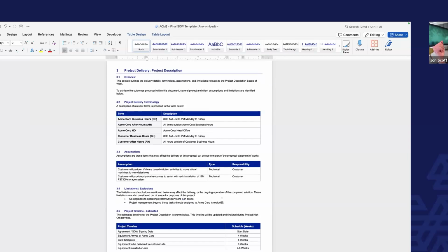What it does too is it gives your engineer, so you're scoping this work, assume the client signs off on it, they're going to start delivering this work. By having a very clear out of scope section, it gives your engineer who's doing the work an opportunity to say, hey, say we're doing a server upgrade or something like that, and we want you to upgrade our network to support this new server. Well, that could take a whole week beyond the initial scope, right? And you need to give the engineer an opportunity to say, hey, this is actually called out specifically here that we're not going to do that.